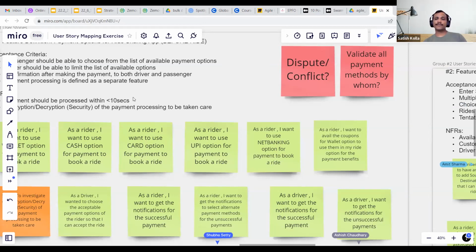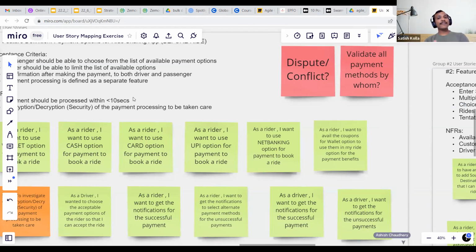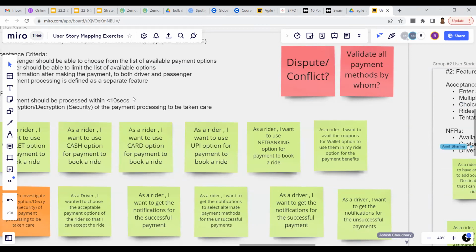So how can I be sure that this business rule is covered somewhere in the user story? When we go to the acceptance criteria, when we detail the stories, yes, it might be included, or we can define it as a separate story or as a spike or as a task, and we can communicate that information. Got it. Okay. So this was the main query that I had.